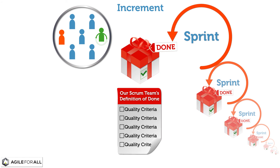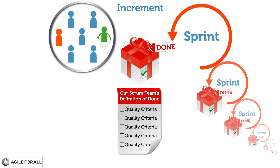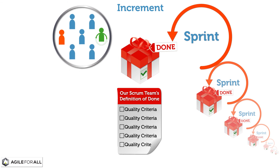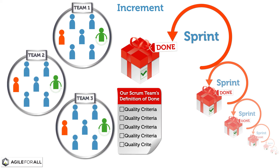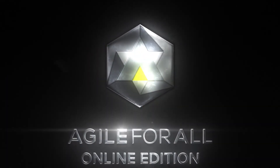This definition will vary significantly per Scrum team, since each team collaboratively creates it based on their own context and goals. When multiple Scrum teams work on the same system or product release, they collaborate to create a shared minimum definition of done to which all teams will adhere.